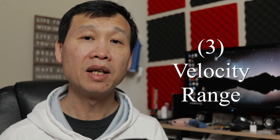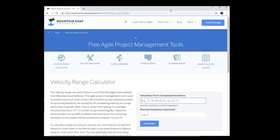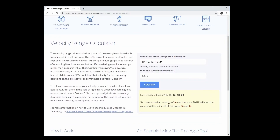Number three is velocity range. This came from Mike Cohn's tool — he has a tool called the velocity range calculator from Mountain Goat Software. This tool allows us to calculate the range of a velocity: what the mean is, what the max is, and what the average is. All you have to do is plug in your numbers. For example, if we have five different velocities — 10, 15, 18, 16, 24 — you click calculate and it gives you the mean, the median of velocity, and there is a 90% chance that your velocity falls between that range. Very simple and straightforward.